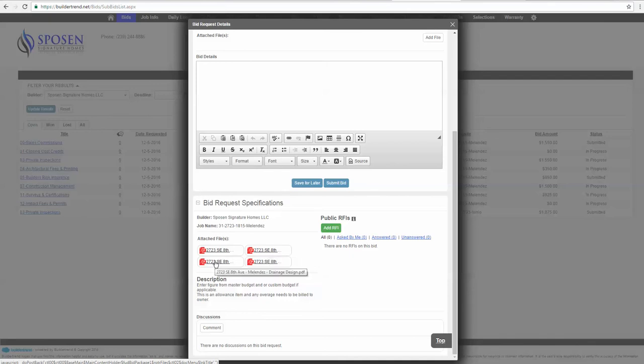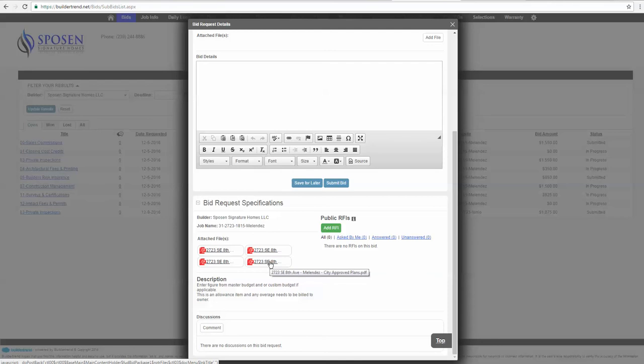It has the drainage design for the site plan. That'll tell you stuff like how many courses of stem wall the house is, what the finished floor elevation is going to be. And it also has the city approved plans attached. So with those four things, you pretty much can bid almost anything on this job. If you're missing any of that, I'll show you a little bit later on where to look for things if you need to find some additional information.